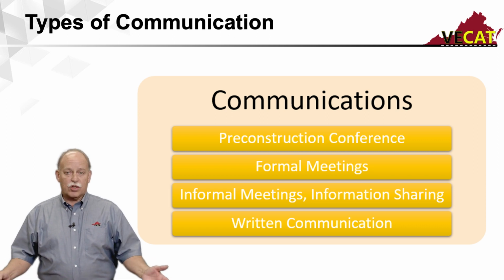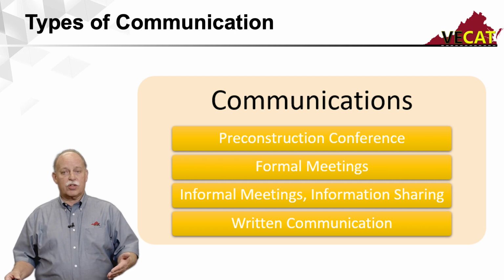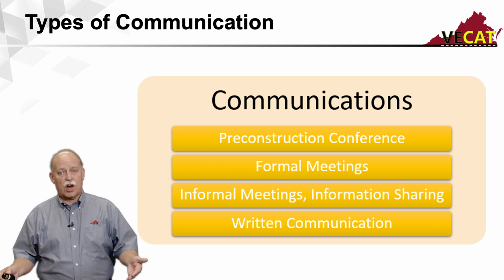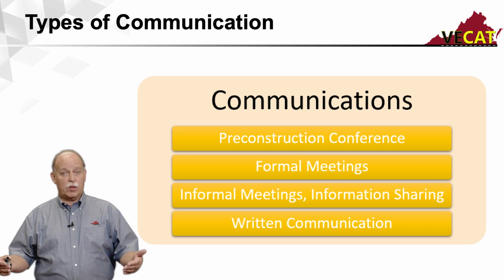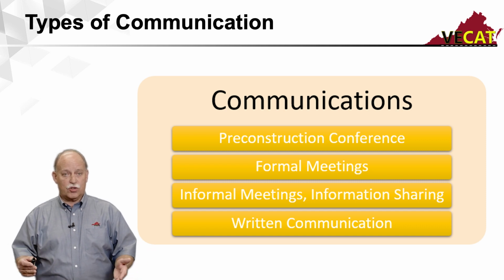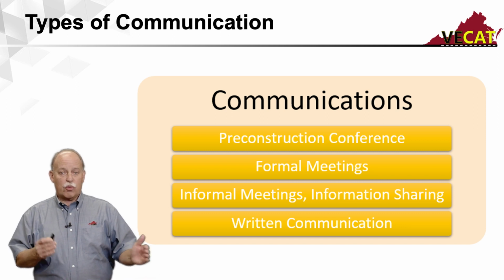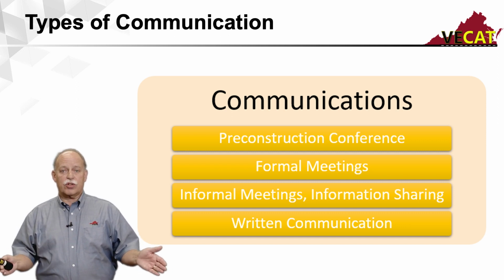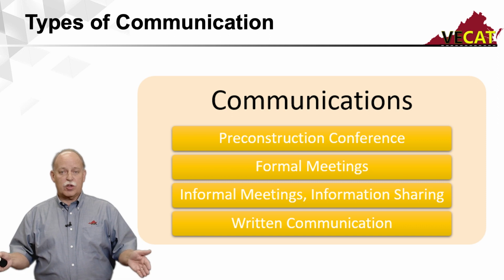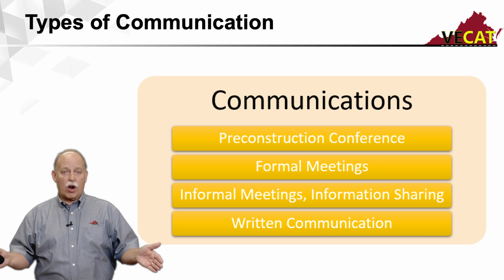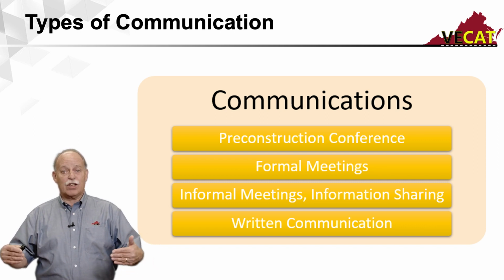Some types of communication that VDOT has for their projects are listed here, things such as a pre-construction conference. That pre-construction conference is what's done at the very beginning of the project, just like it says. So prior to the project beginning, you are required to actually hold a pre-construction conference for every single project. So there's always a pre-construction conference for all projects, and that will occur shortly before the beginning of construction.